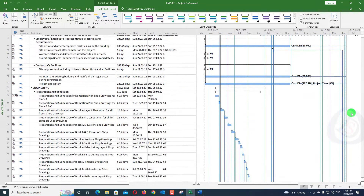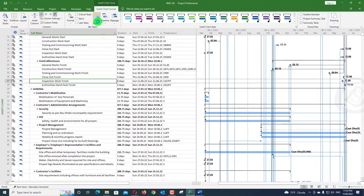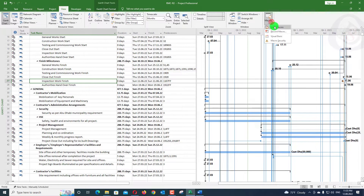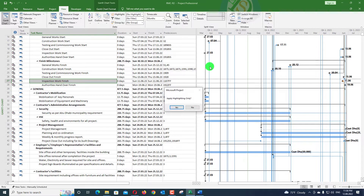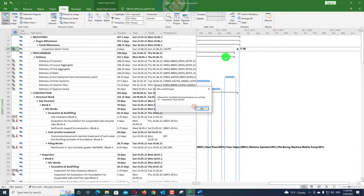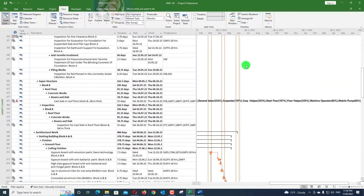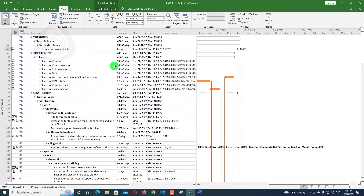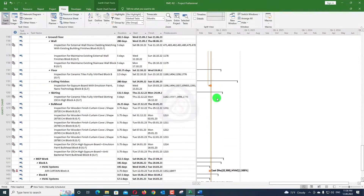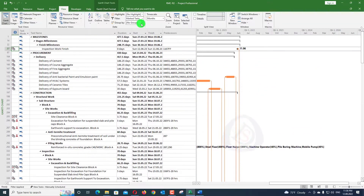For example, I select this activity — it should be marked as 'Driving Predecessor,' shown with an orange line. Then go to View > Macros > 'Apply Driving Predecessor Filter' and press Run. When prompted, say No to highlight-only mode. You will then see all the activities filtered — only those orange-line activities, the driving predecessors, are now shown in the schedule. The filter used is 'Marked Tasks,' so only marked tasks will be displayed.